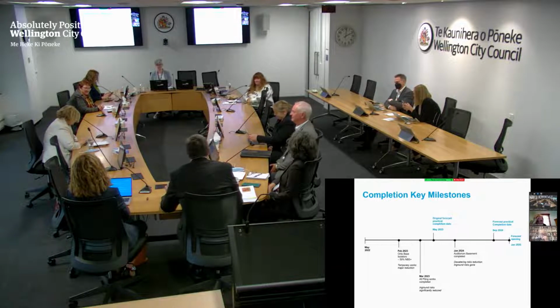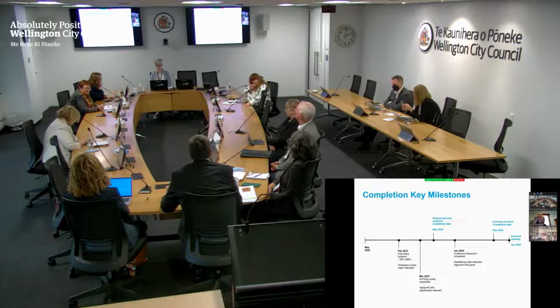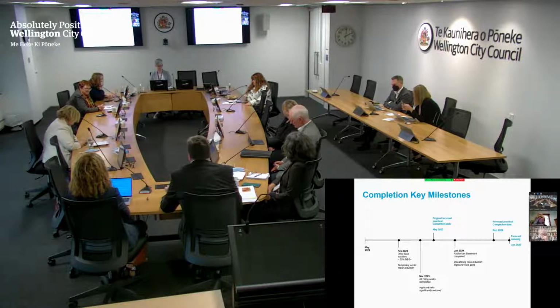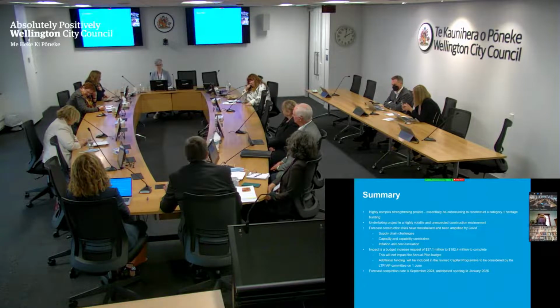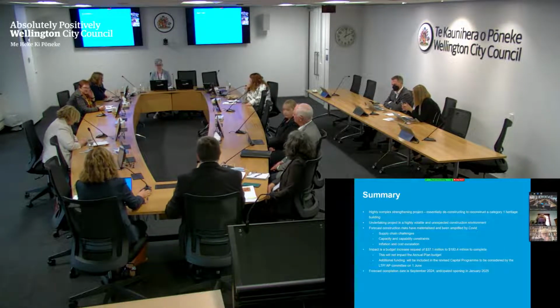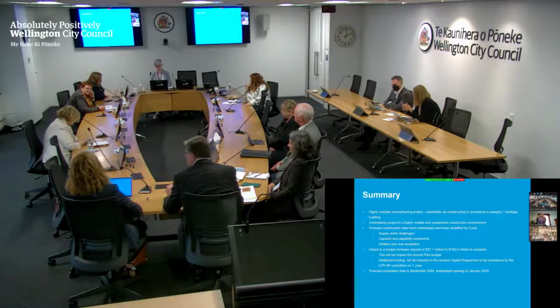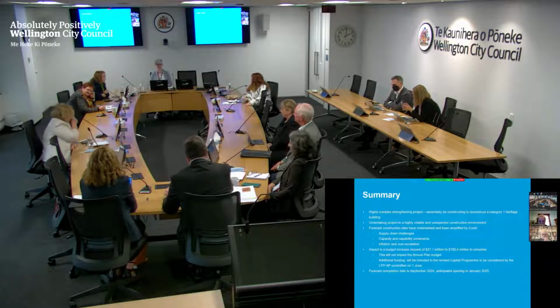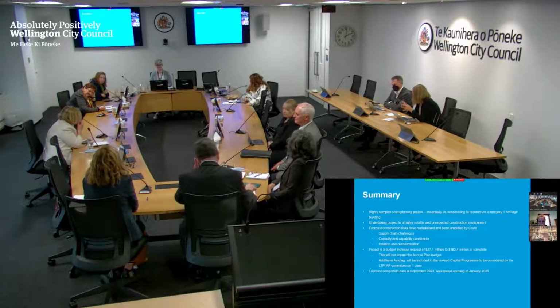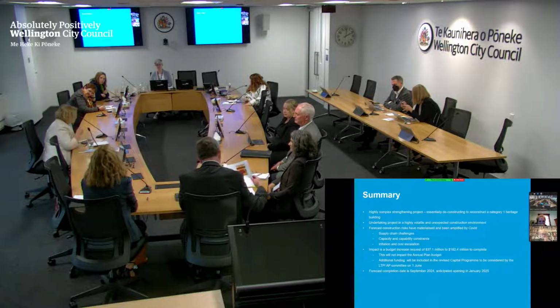So as we then look to our completion dates of September 2024, and then hopefully the building opening, as Barbara mentioned, first quarter of 2025, the gap is really about your fit out of your tenants and your commissioning of the tenants' works. So at this point, I'll pass back to Barbara to basically provide a summary. Thank you, Danny. And once I've undertaken this summary, I'm sure you'll have questions.